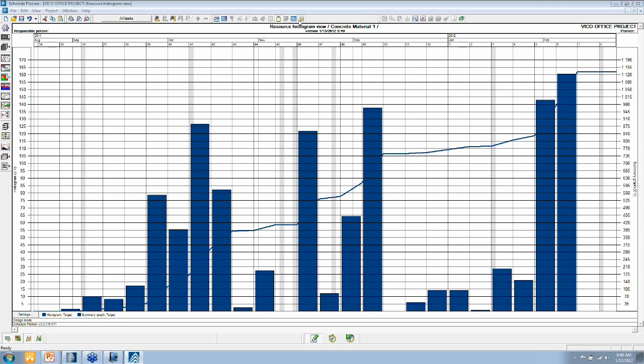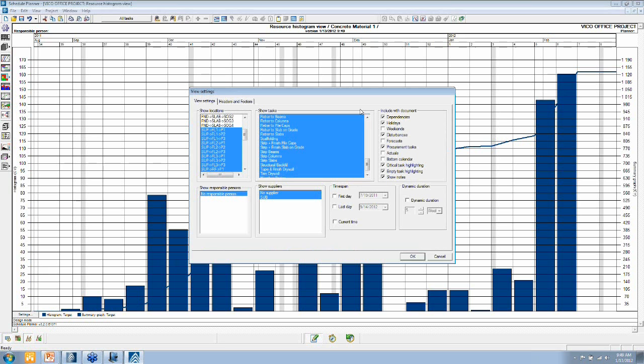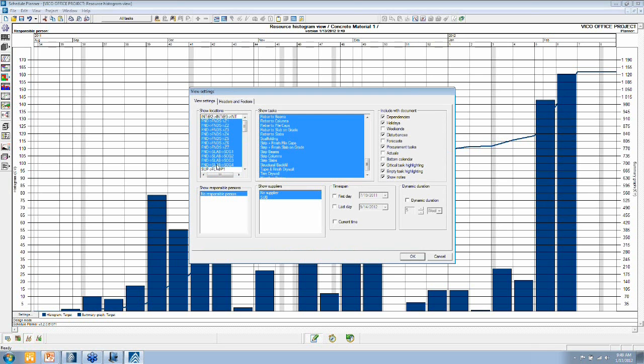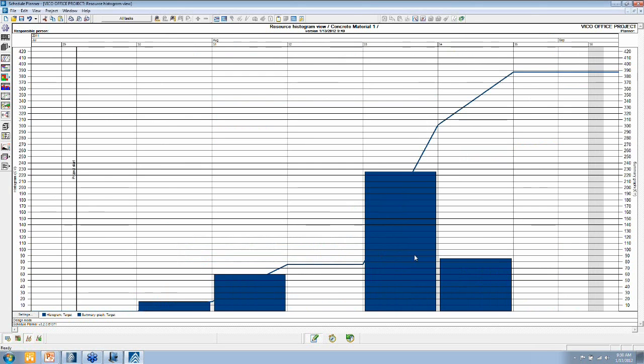All of these views can be filtered. So if I only want to see foundation, my amount of concrete that I need for the foundation, I just filter out the foundation locations. Click OK, and that updates. The histogram shows me per week how much concrete I need just for the foundation level.